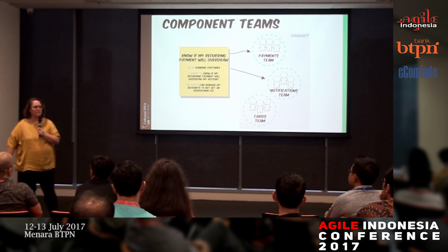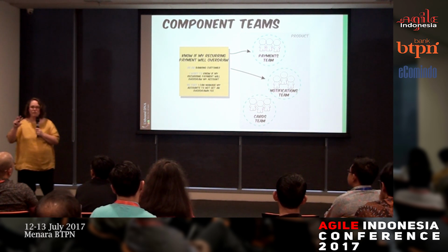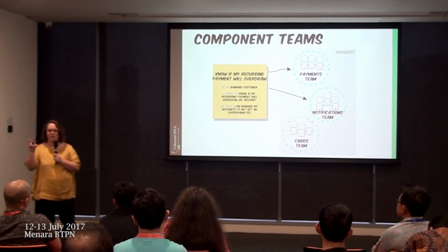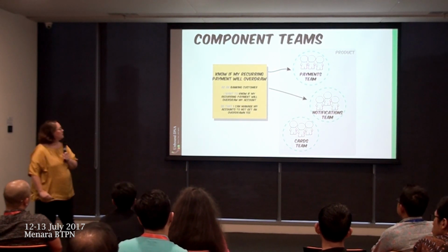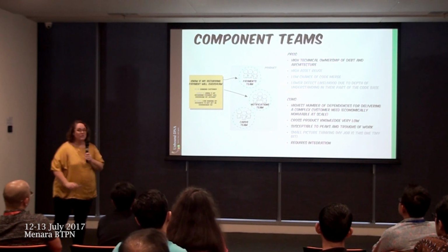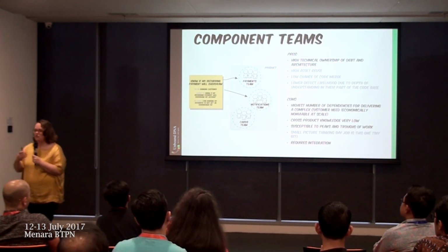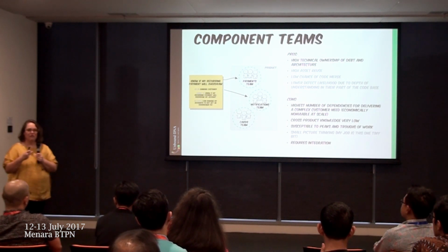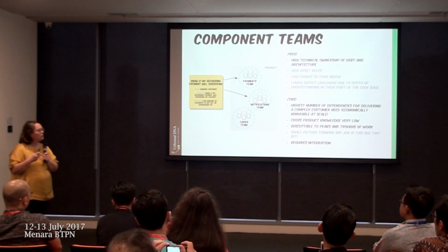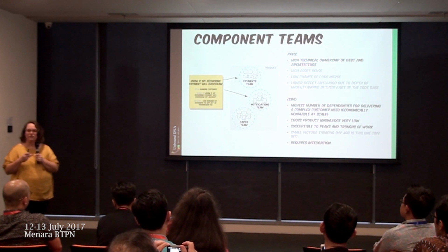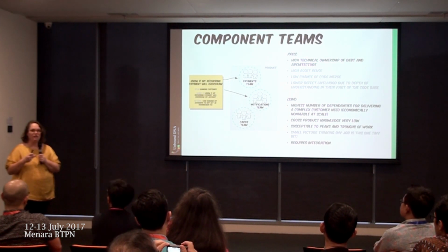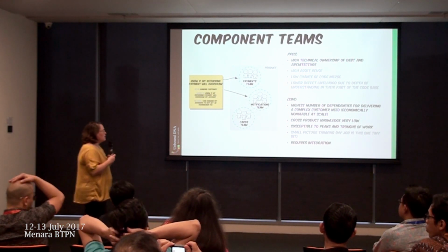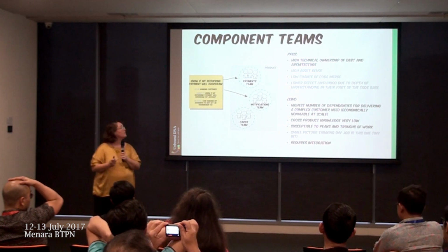Okay, they're component teams. Very small parts of screens can be broken down into component teams, and that's effectively what Spotify has done. What's great about this is that you have really strong ownership of that particular part of the system. I do feel it has the risk of really high levels of dependencies though, if you've got a really big feature that needs to be built. If it goes across multiple of these, it requires integration again.